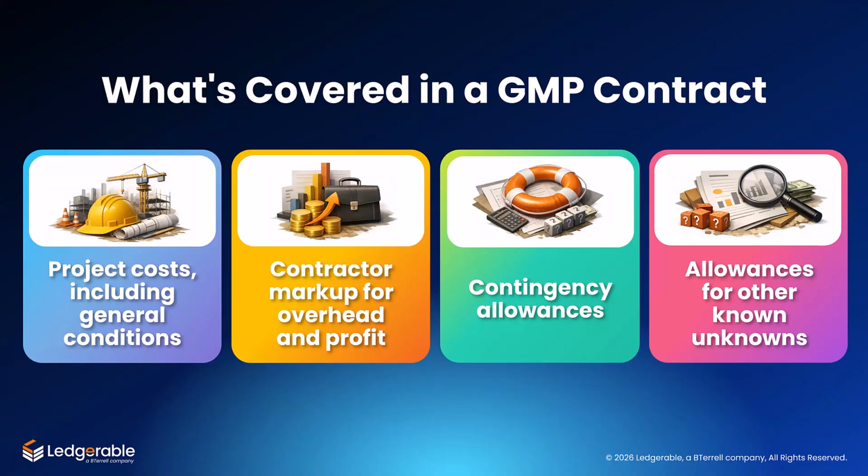One of these elements is often a contingency allowance, which is a common way to cushion the impact of unknowns, such as uncertain soil conditions. These contingency buffers often mean the difference between a profitable and an unprofitable contract. Also, GMP contracts may include allowances that provide budget for owner decisions not yet made at the time of the agreement.